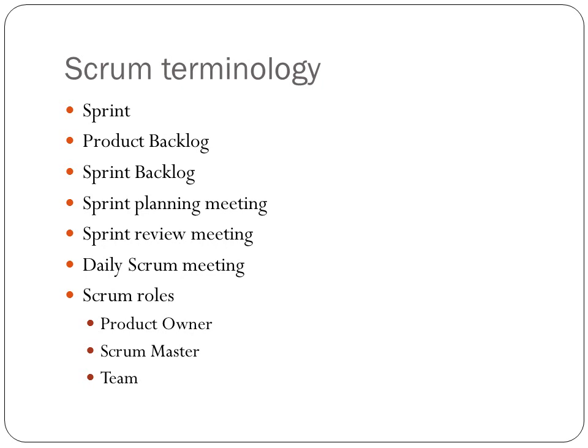There are some important terms associated with this Scrum process which we will look into now. First comes the sprint. Sprint is the time duration which is needed to complete an entire iteration or a cycle. Next comes the product backlog. It is a repository of client prioritized requirements. Next comes sprint backlog. It is a subset of product backlog in which the requirements will be present for the current sprint. Next comes sprint planning meeting.